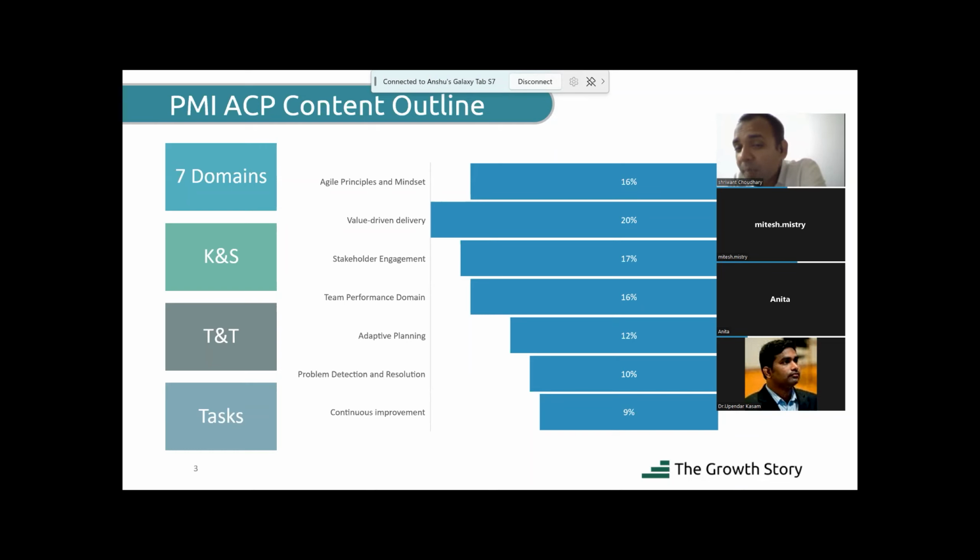Tasks are not measured in story points. Tasks are measured in absolute terms. Absolute estimate and relative estimate we discussed, right? Yeah. So, absolute estimates are estimates in terms of days, time, minutes. All these are absolute estimates.